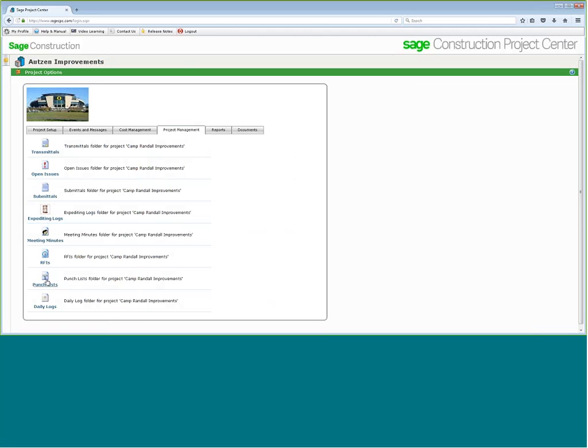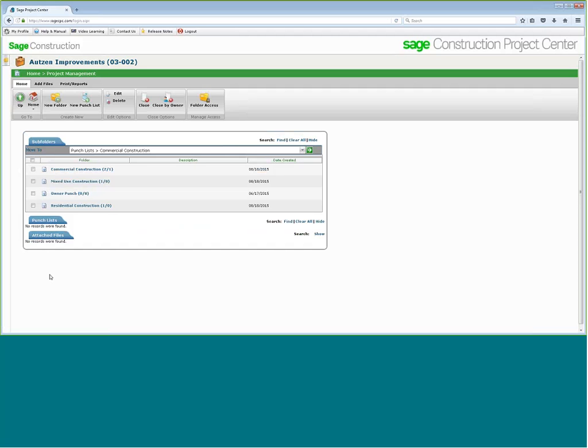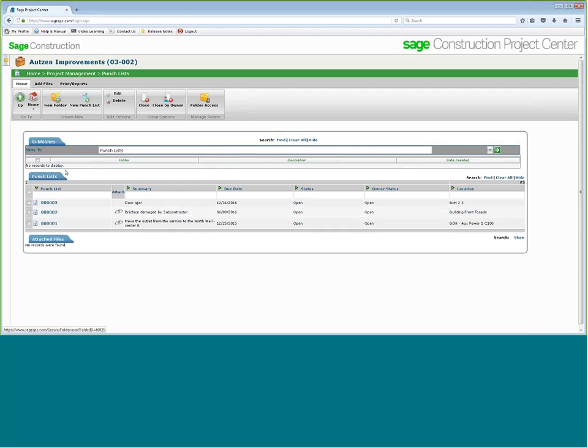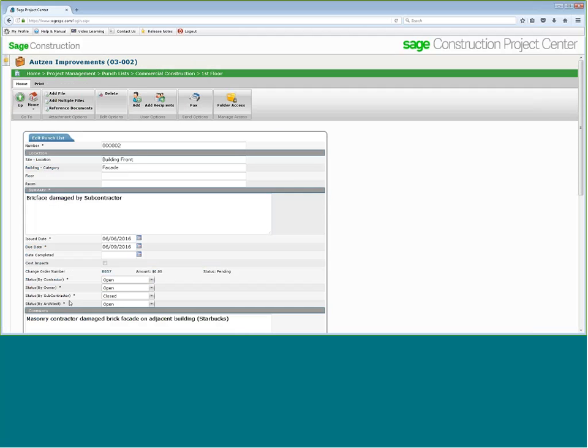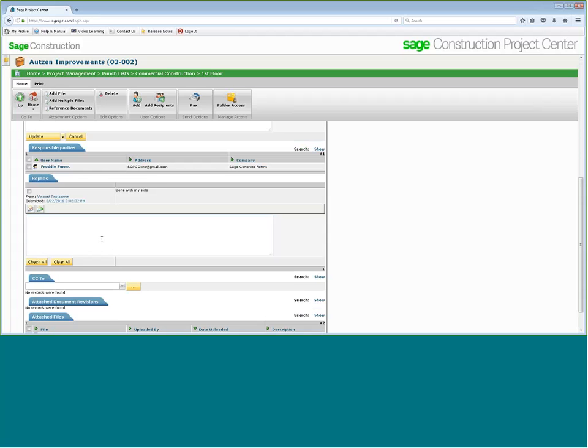We have punch lists that you can customize how those are broken out and have up to 4 different punches. So if I want to say we have an owner punch, a contractor, a subcontractor, an architect, and did I miss any? Nope, we got them all. All of these are different punches, and we can have up to 4 on every single item. And these have who's responsible marked on it, other CC people can be invited, and we track all the conversations going along with them, back and forth on the replies and everything else in between.